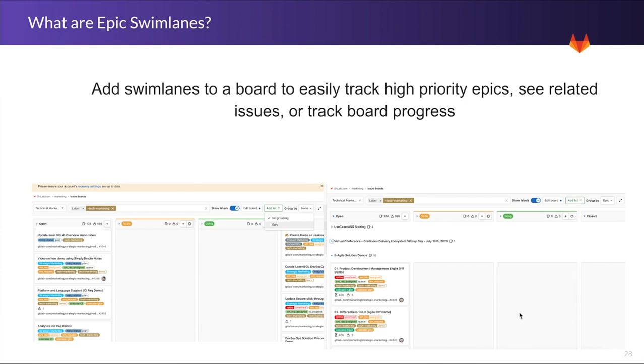you go up to the top right corner, it's group by, and you can put group by Epic, and what that's going to do, it's now going to organize all those issues that are part of your board on that Epic board, as part of those Swimlanes that are organized by Epics.